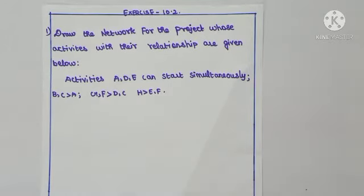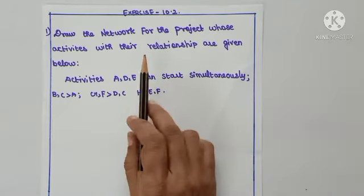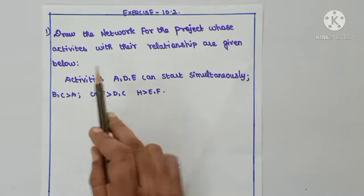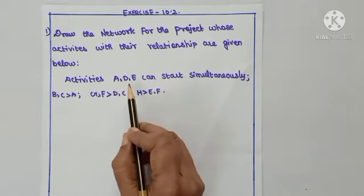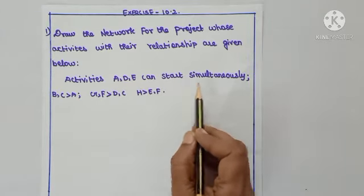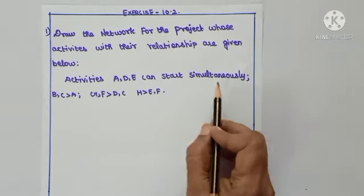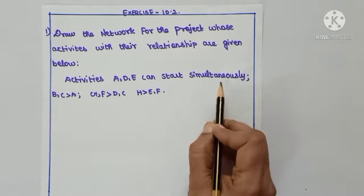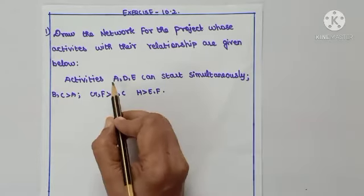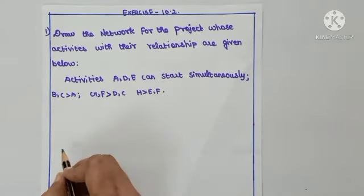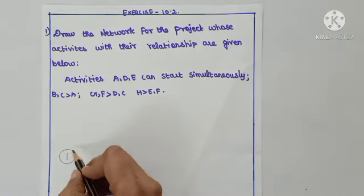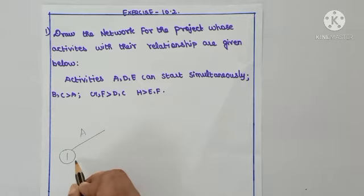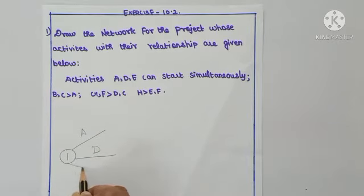Exercise 10.2, Question number 1: Draw the network for the project. Activities A, D, E can start simultaneously. The word simultaneously means together, at the same time. So A, D, E are the starting activities. We mark event 1 and then draw A, D, and E from it.